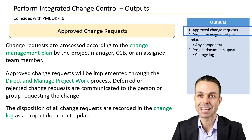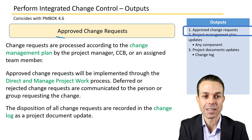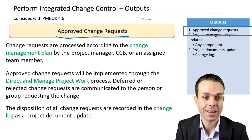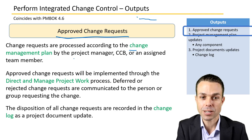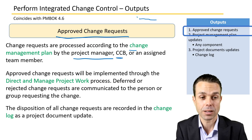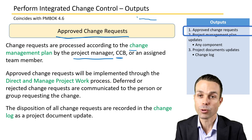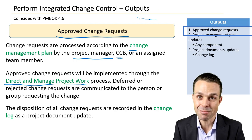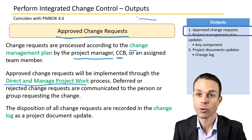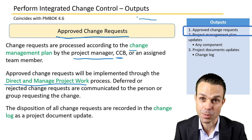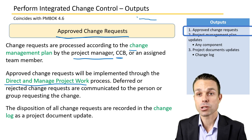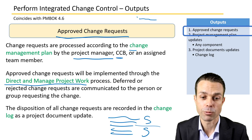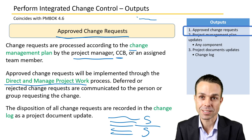Looking at the outputs of Perform Integrated Change Control: the main output is approved change requests. The change request came in, went through the process, and now comes out as an approved change request. Change requests are processed according to the change management plan by the project manager, the change control board, or an assigned team member. Approved change requests will be implemented through the direct and manage project work process. Deferred or rejected change requests are communicated back to the person or group requesting that change — they still need to know — and the disposition of all change requests is recorded in the change log.